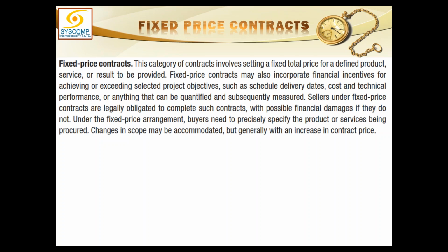So the lump sum figure they come up with, they say this will cost you, say, 6 crore rupees. So I must have my own calculations done before this, and I must have a fair picture that if I was to do this project by myself and I would have to buy the things directly from the market and services right from the market, how much it would have costed me.